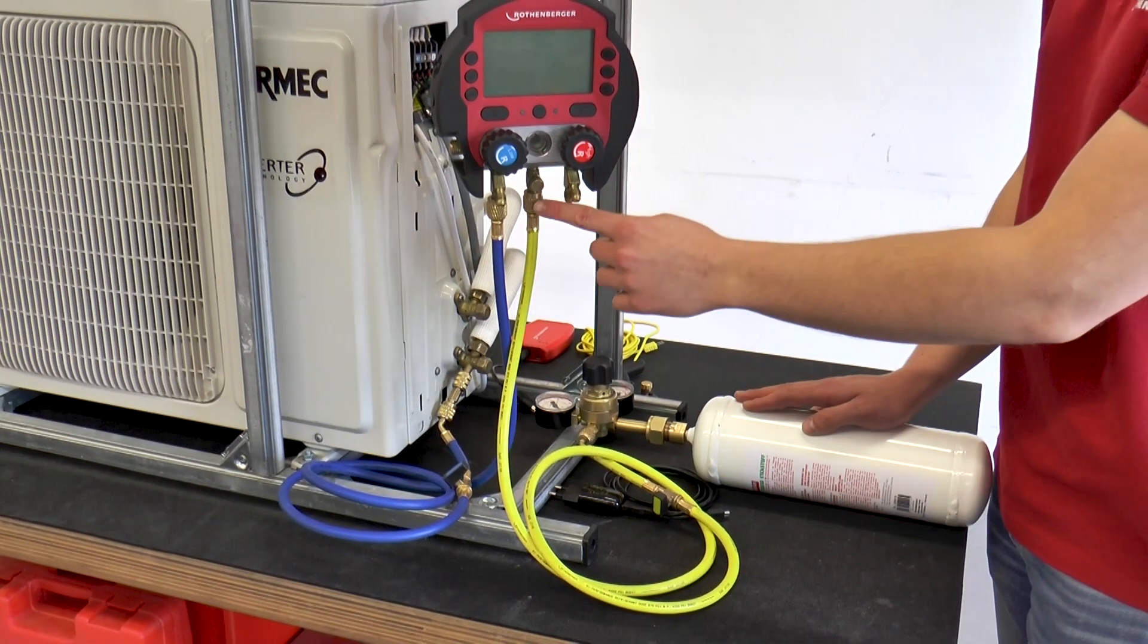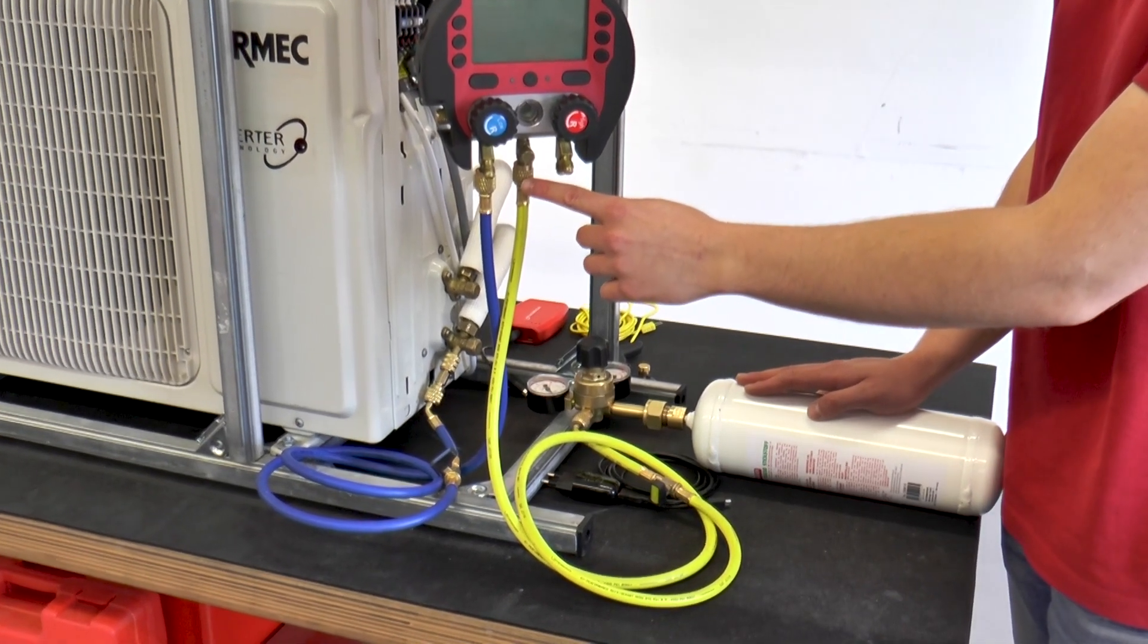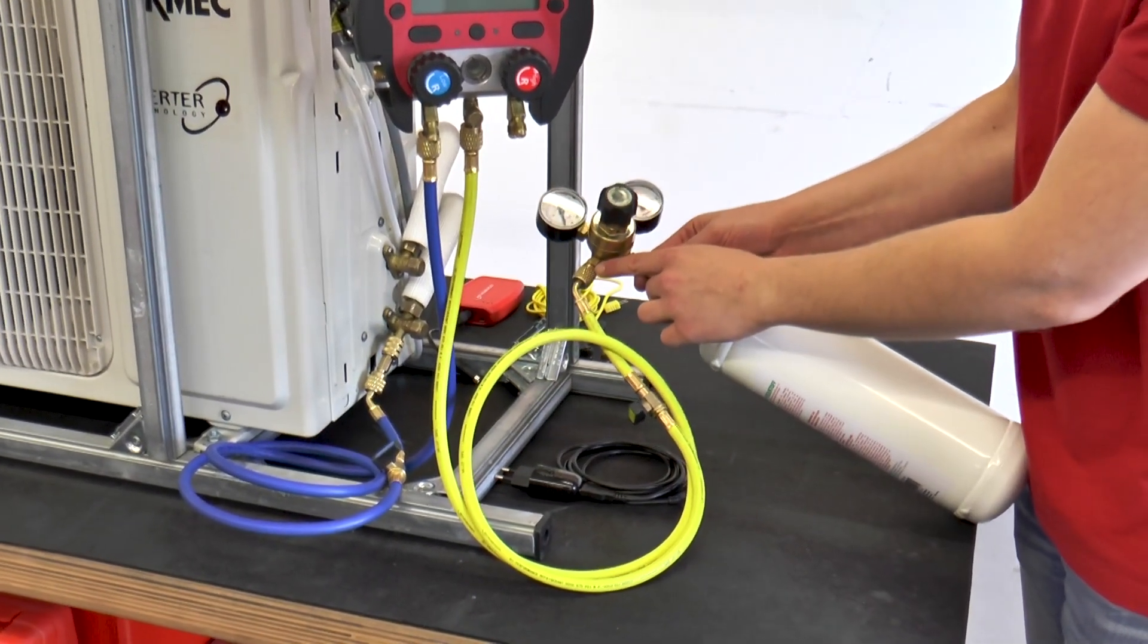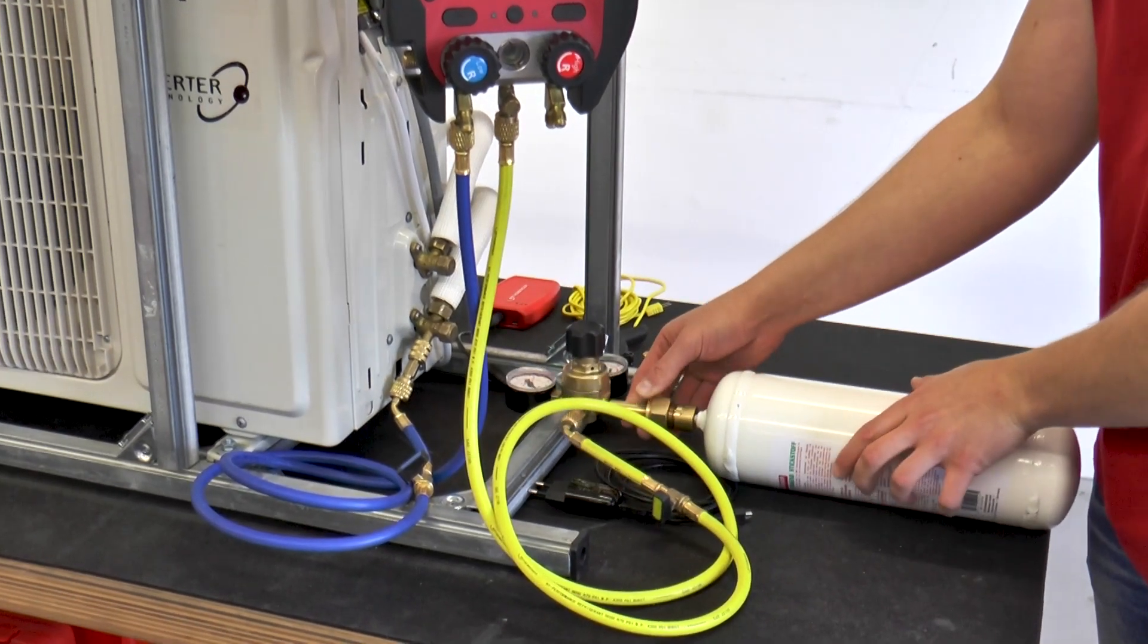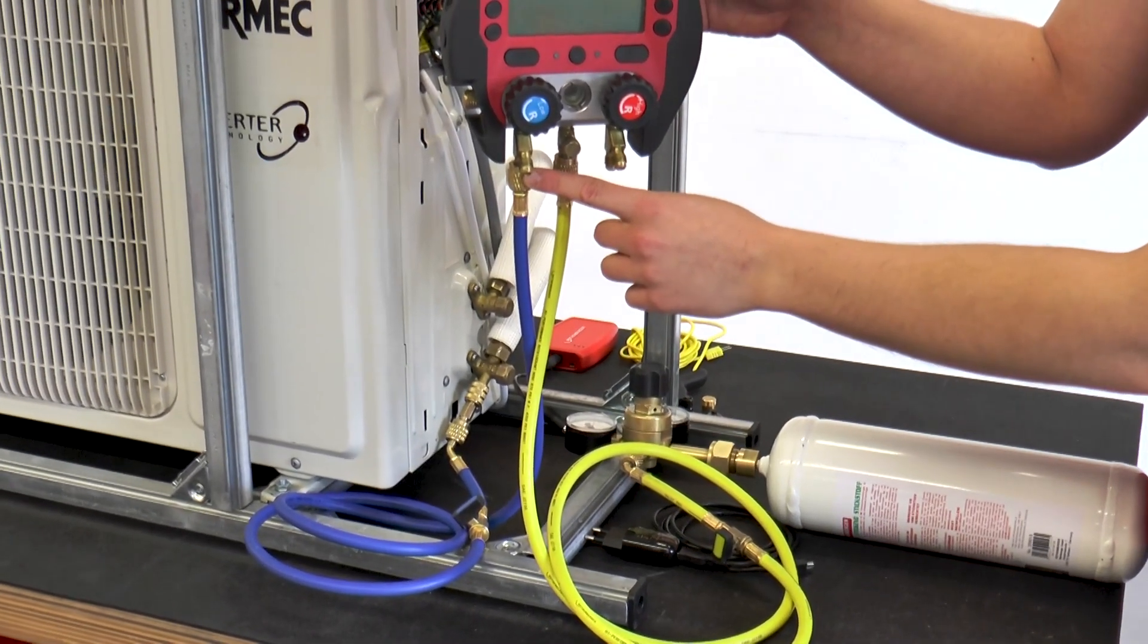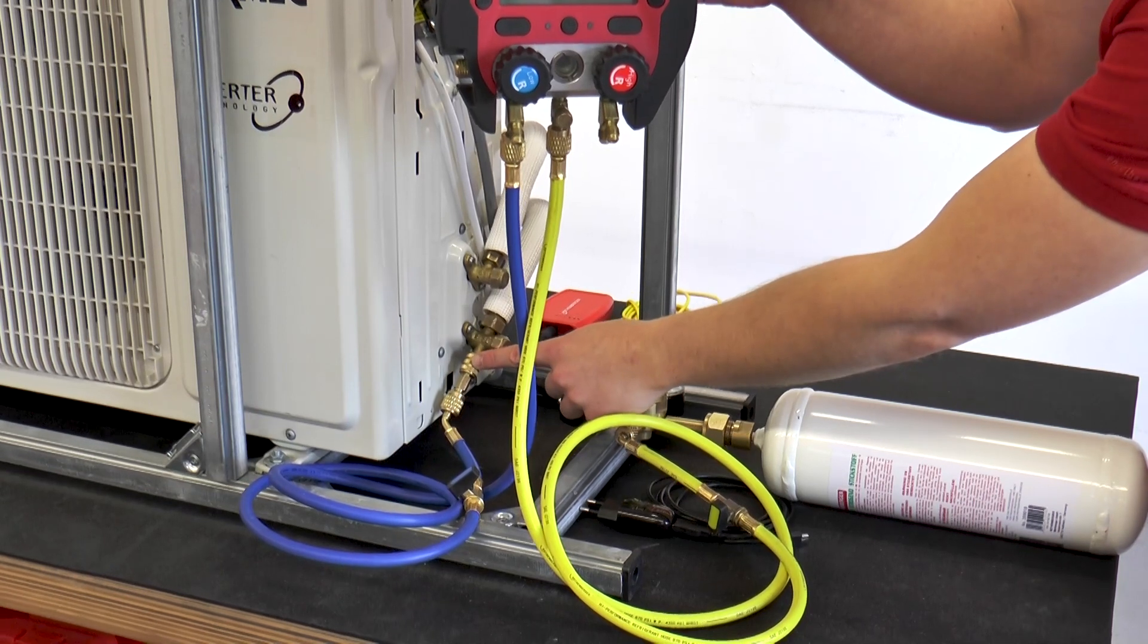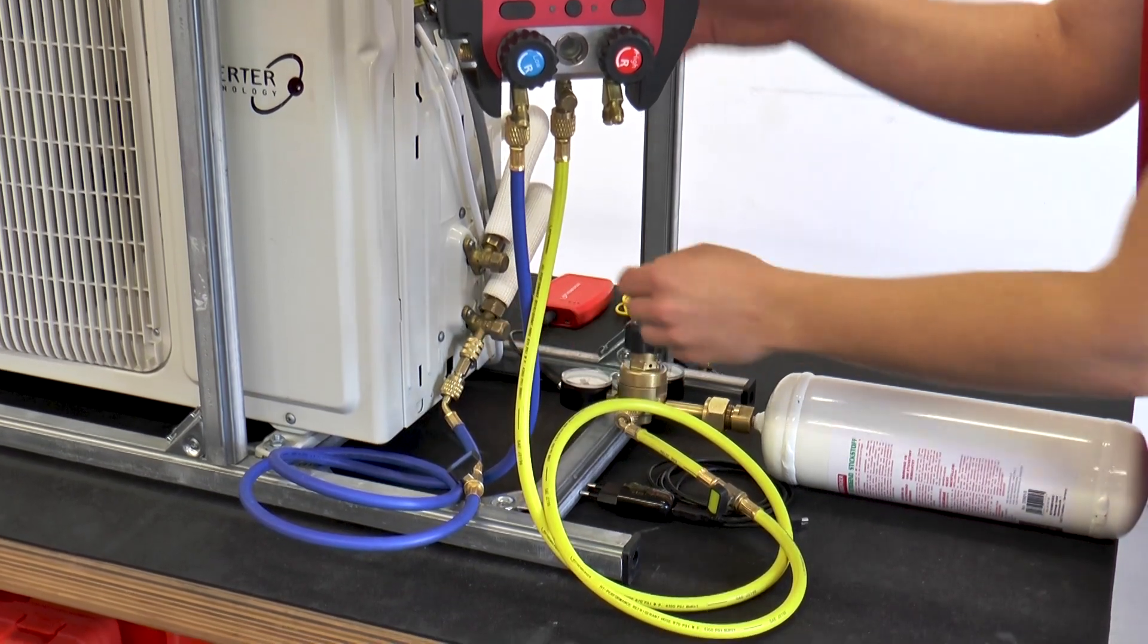Now the yellow working hose, which is connected to the middle connection of the Rokul, is attached to our pressure reducer. The blue working hose is attached to the low pressure side of the Rokul 600 and to the service valve of the air conditioner.